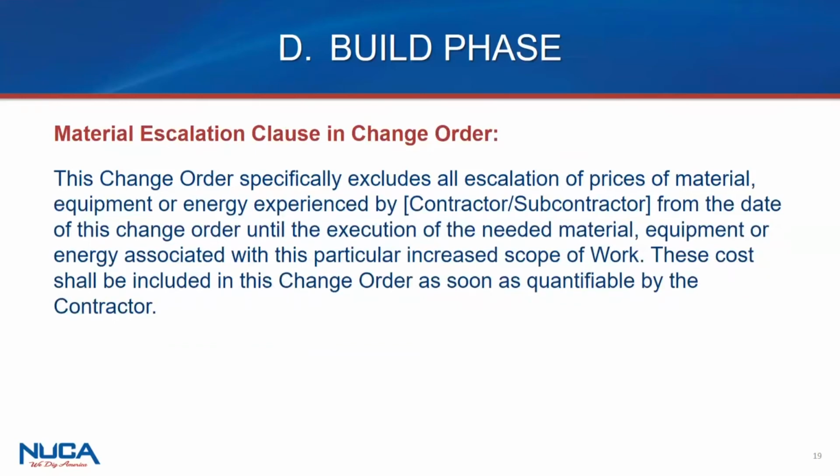What I want to tell you about change orders, when we all know what a change order is, but change orders can change the terms of your contract as well. It's not just, I want this money and this time. A change order, legally speaking, is just a rider or an amendment to the contract.